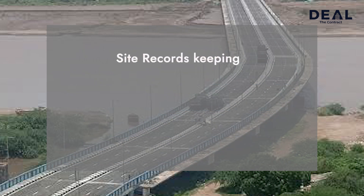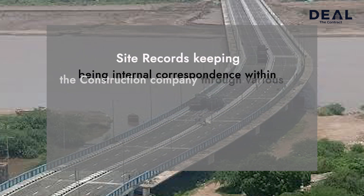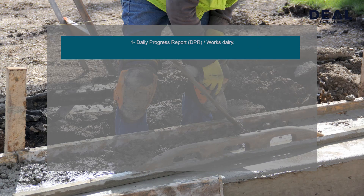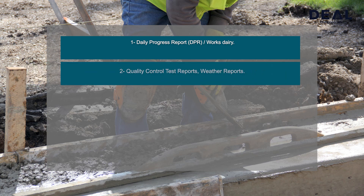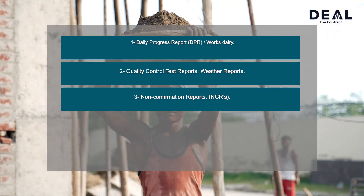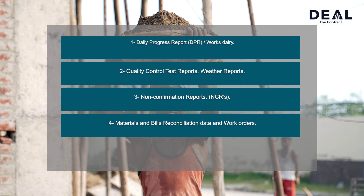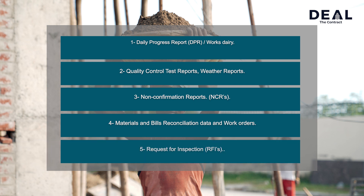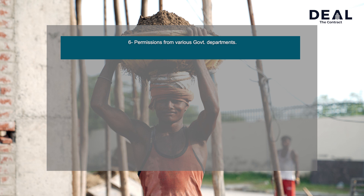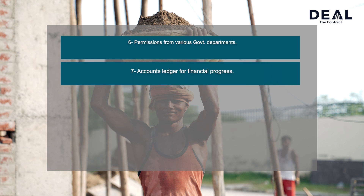Site records keeping, being internal correspondence within the construction company, is managed through various key search words like: daily progress reports (DPR) or works diary; quality control, test reports, weather reports, non-conformance reports (NCRs); materials and bill cancellation data and work orders; requests for inspection (RFIs); permissions from various government departments; and accounts ledger for financial progress.